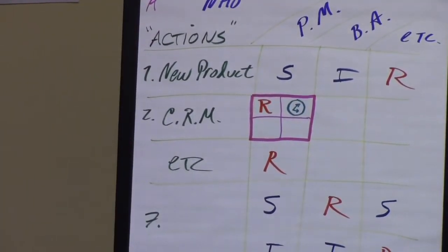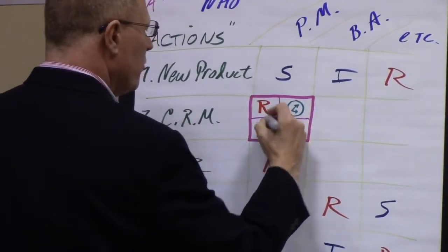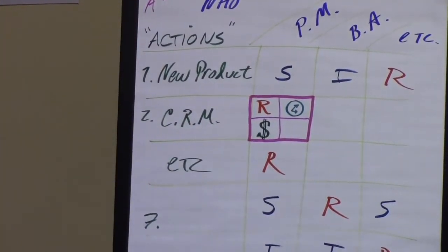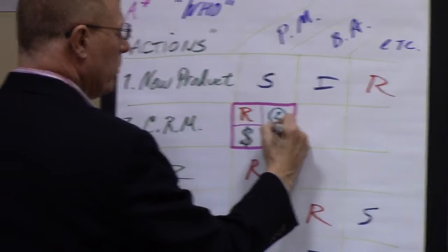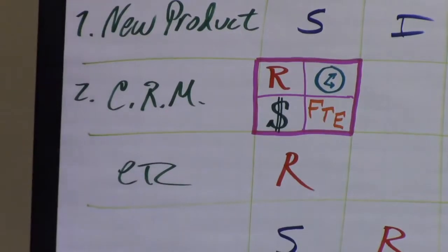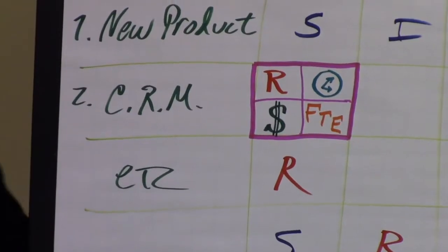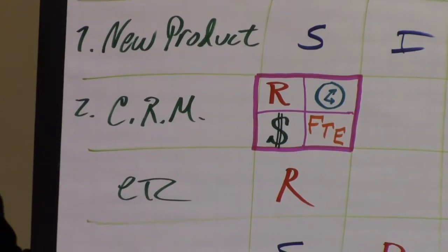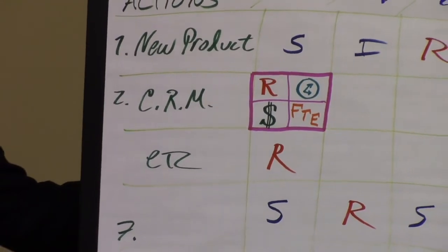And the 2 additional questions worth asking might be, how much resource do you need to support this? Because typically somebody being responsible is certainly not clueless. They do have a guess or an estimate. Finally, we could ask how much labor is required to bring it to fruition. And the term we use and is frequently used is called FTE. If you're unfamiliar with FTE, 1 FTE is 1 person for 1 year. That's equivalent to 12 people for 1 month or 52 people for 1 week. They're all equal to 1 FTE, which is approximately 2,000 hours per year.